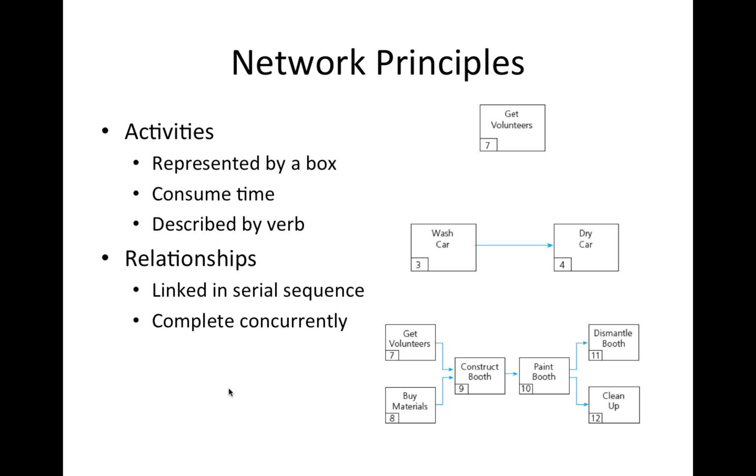So some of the guidelines for the level of detail in the network diagram are as follows. Based on the work breakdown structure for a project, specific activities should be defined for each work package. It may be preferable to draw a summary level network first, showing a small number of high level activities, and then expand it into a detailed network diagram. The level of detail may be determined by certain obvious interface or transfer points, where there is a change in responsibility or a tangible output resulting from an activity.